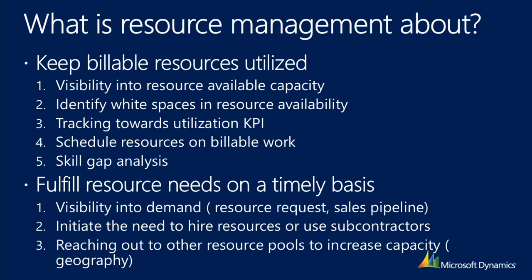The second thing is being able to identify the white spaces in resource availability. Like memory, like any other thing where you consume a resource, people have these fragmented areas of assignment, right? There is a week that they don't have much to do. All of a sudden, there are 3 days that they are really busy. A resource management function could really improve that by consolidating these white spaces and seeing whether you can substitute resources with other qualified resources so that the quality of the job is not compromised, but you have a better utilization. And you can get resources on jobs that really need that set of qualifications or the role that is required.